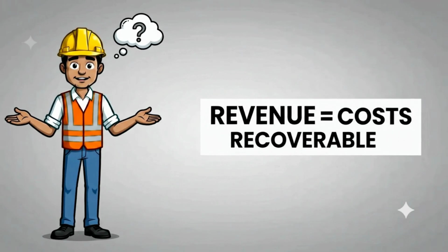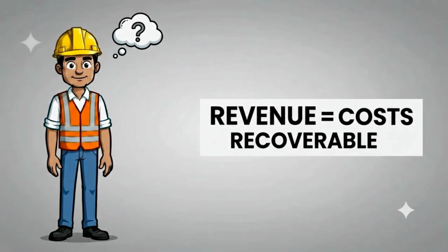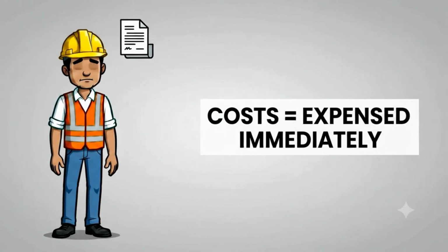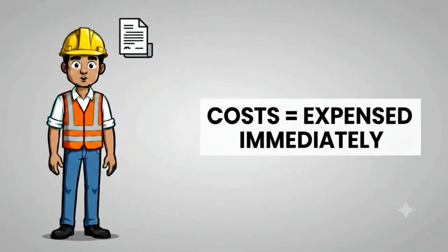Then revenue is recognized only to the extent of costs incurred that are likely to be recovered. And contract costs are recognized as an expense in the same period they're incurred. This is often called the zero-profit approach.